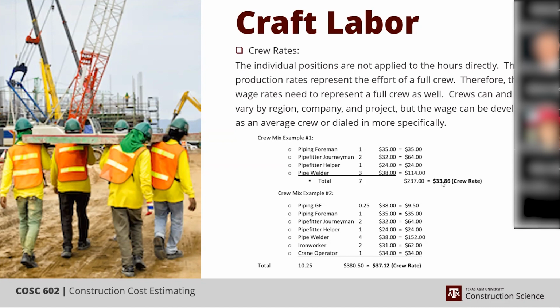Since we typically self-perform 40 to 60% of the work, we have lunch tents, warehouses, maintenance shops, fabrication shops, we build parking lots, laydown yards, field offices. We have a full gamut of stuff. A lot of times we're putting up temporary fence, guard shacks. So the indirect costs we have tend to exceed what you normally include in general conditions, but they're principally similar things, if that makes sense.